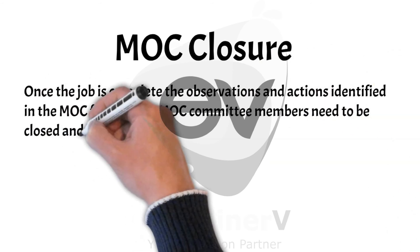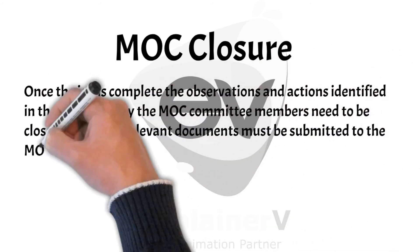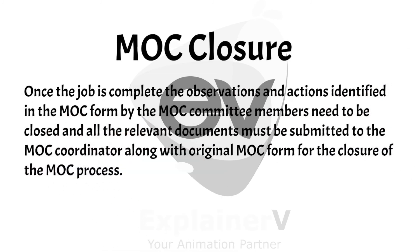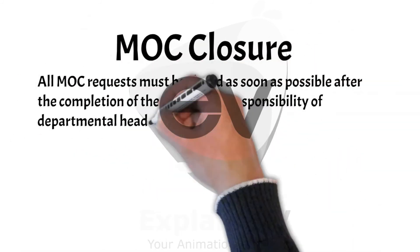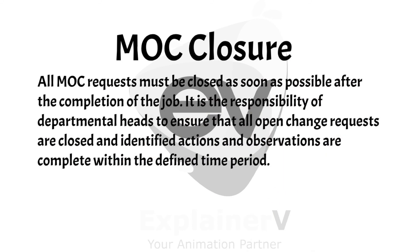Once the MOC has approved, the change can be made as per the approved scope and criteria. After completion of the job, there is a need for MOC closure. MOC closure is a verification process to verify that the change has been made as per the approved scope and guidelines. The departmental heads must ensure to close all the actions identified during MOC review as soon as the change has been completed. This would also include updating the old drawings, procedures, layouts, risk assessments, and retraining of the relevant staff.